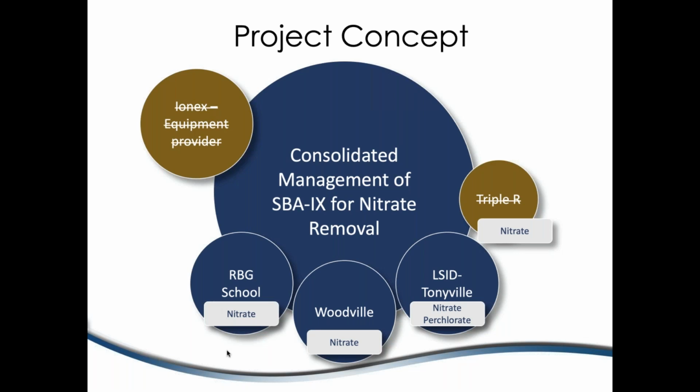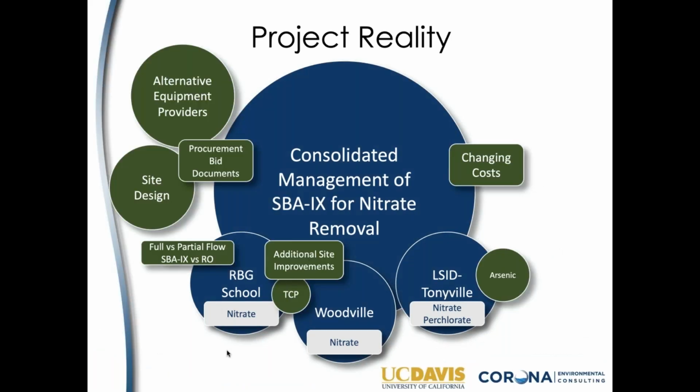Ionix exited the US marketplace. RRR found a different approach to address their water quality, moving from a centralized system to a point of use system, which is still being played out now. And then more so, the remaining factors complicated things even more. So instead of having the equipment provider as a part of the project, we now need to procure the equipment from a marketplace that perhaps isn't as well developed as we'd like, go through the site design.